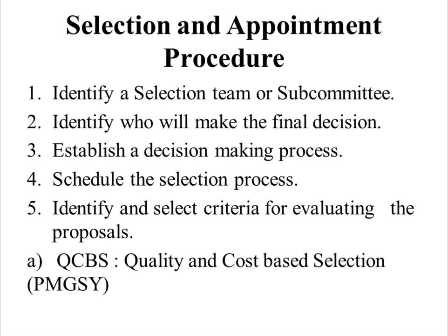Now we'll be seeing the selection and appointment procedure of a PMC. The first procedure is to identify a selection team or subcommittee. The next procedure is to identify who will make the final decision.